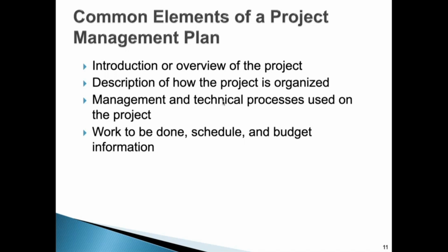And so these have to be shown, and usually we have a project organizational chart. Okay, you have an organizational chart which shows the positions, and then you have a table. In this table you will state the roles from the organizational chart. You will state the role and you will describe it. What is this role? Okay, he's the technical lead.